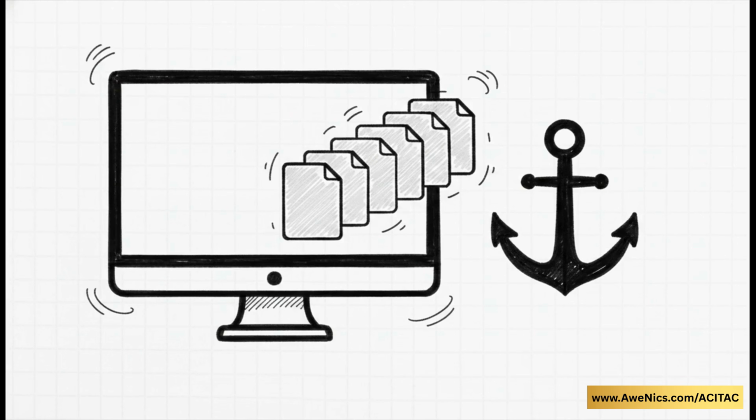You are absolutely not stuck with just one baseline save. The software actually lets you save up to 11 different baselines, so you can have baseline 1, baseline 2, baseline 3, and so on. It's a lifesaver because it means you can keep copies of your old, outdated baselines while constantly updating your primary digital anchor as the scope inevitably pivots during that early planning phase.